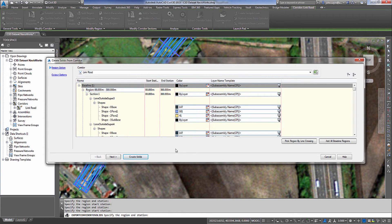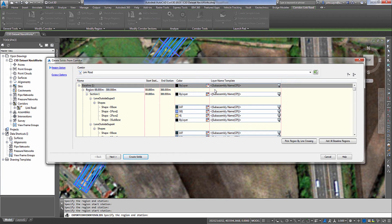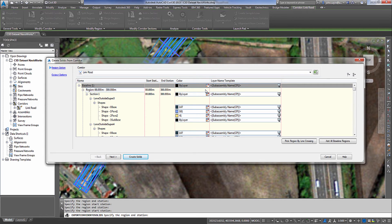Once our regions are set, then the next thing we want to do is we want to look at our layer name template. So whenever it dumps out the Corridor Solids, I want to be able to match these items up to my Gantt chart inside of the Timeliner in Autodesk Navisworks Manage.